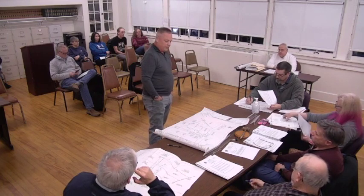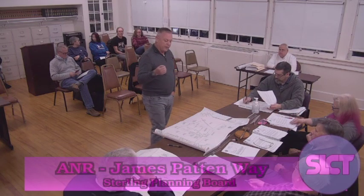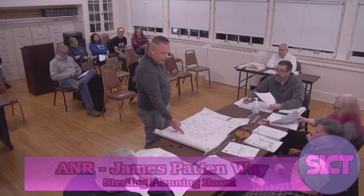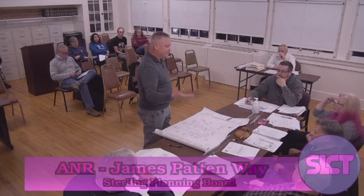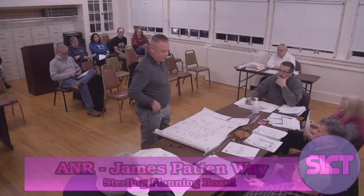Okay, excellent. I spoke with the Department of Public Works regarding it too, and Brian said that they don't maintain it, but he did ask that if I move forward on it, that I work with him to install a public water line up the road. Right now, the existing houses on there with frontage have a 1-inch line that runs all the way down the line. So if I move forward with it, I'll actually put in a water main and a hydrant and so forth to bring it up a little bit better.